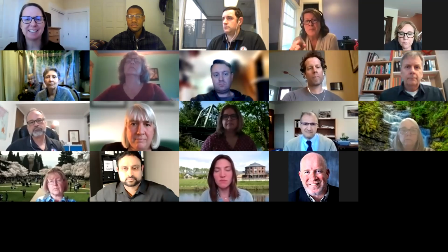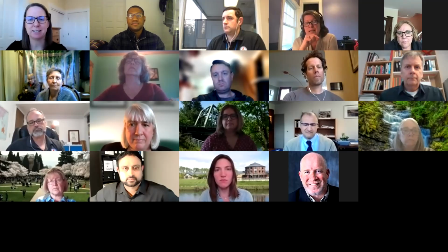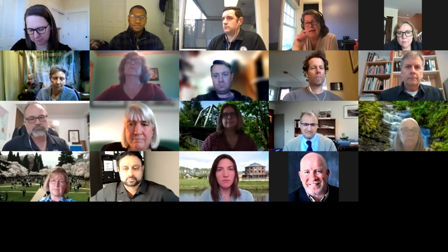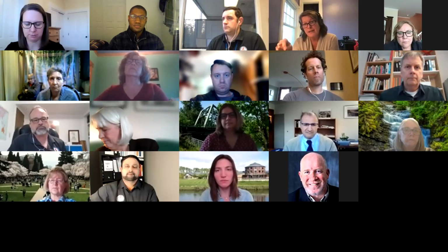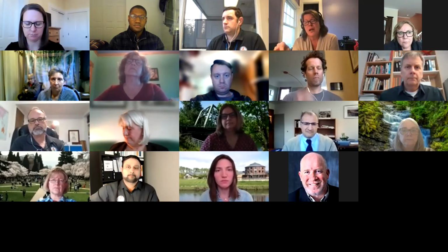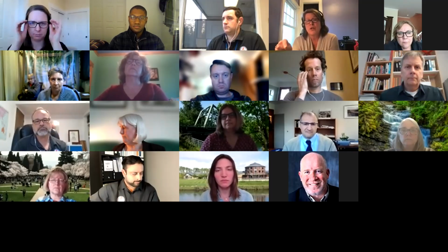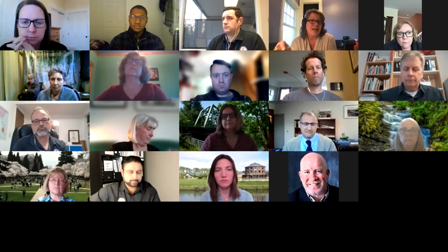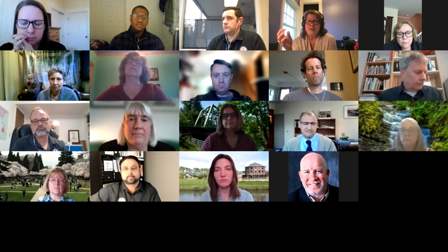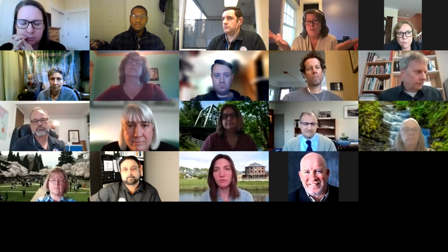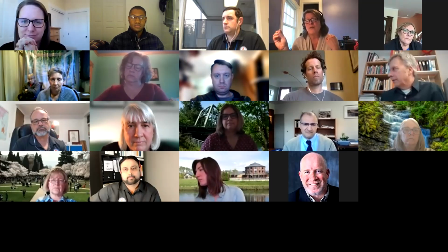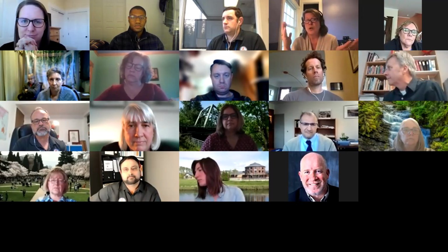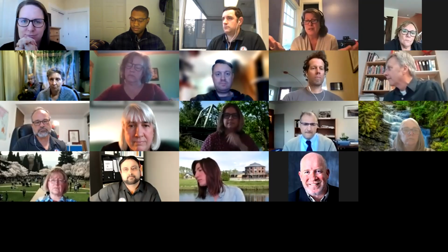Yeah, I just want to jump in on that real quick, because one of the things that we've been looking at is if we push the postcard out this Friday, we wanted to give as much time as possible for the community to know about the event. So actually looking at all of you to say what is more important, because the postcard is going to include the survey that will have all the questions.